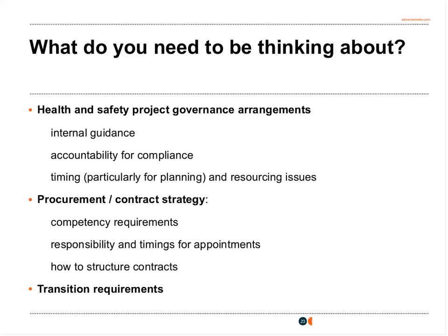In terms of your procurement and contract strategy, we talked a little bit about setting criteria for competencies for projects and using those in pre-qualification questionnaires and part of tender processes. If that has not been done so already, we would recommend that your procurement teams and others look at that.